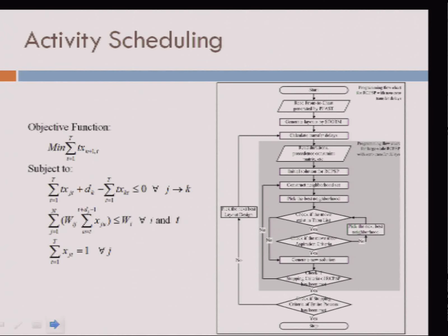Now, once you have designed the layout, keep in mind again, we are looking at systems improvement. So not only do we improve the work layout, but we also ask, could the sequence of execution of the various activities be improved? More so, is it possible that a second person could work in parallel with the main press operator so that the overall cycle time for the entire setup is reduced, right? This is where activity scheduling complements the workplace layout.